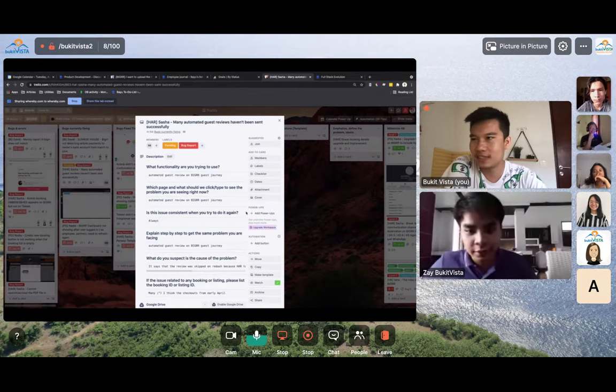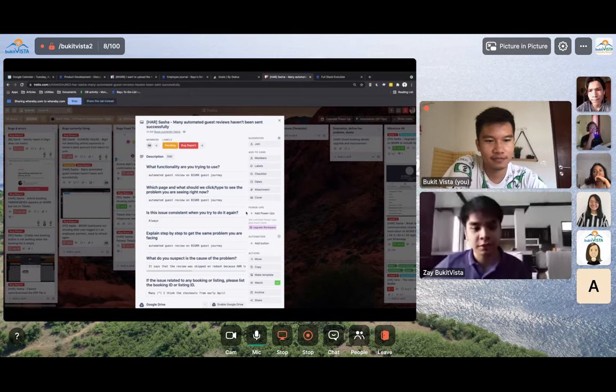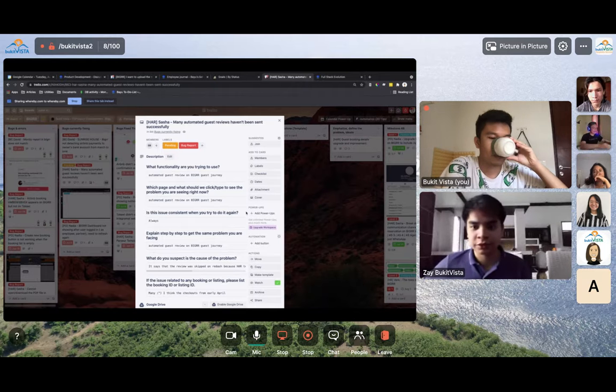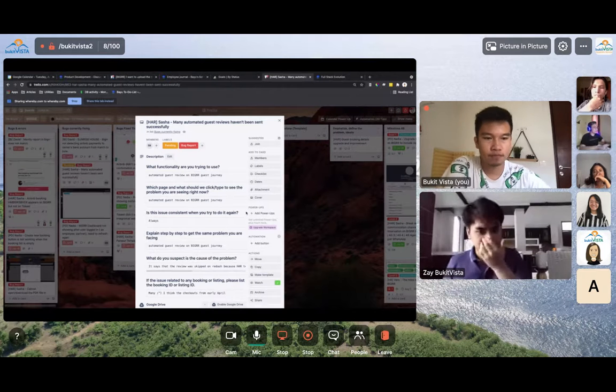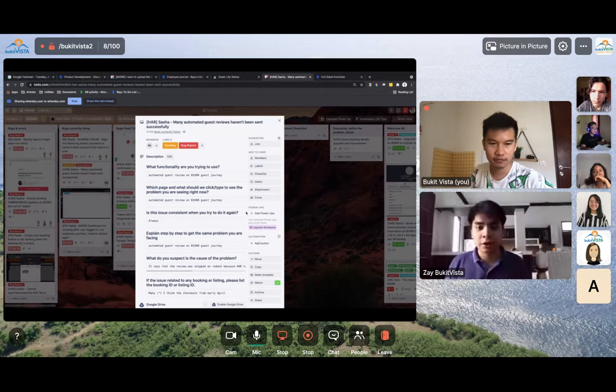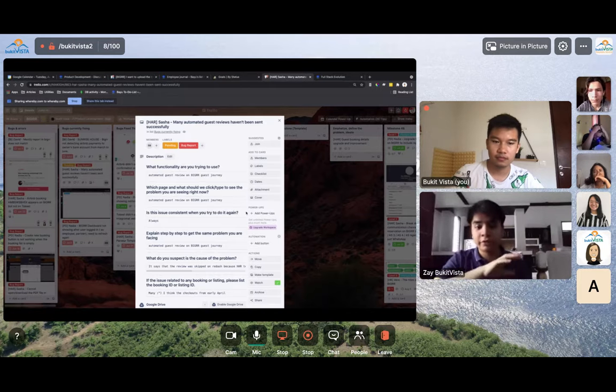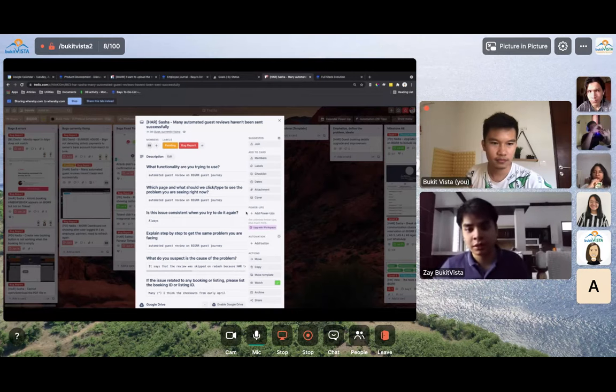May I ask this question, Kak? Yes, Jay. Why don't we have something like stand-ups in sprints in Scrum? Ah, okay. Tell us more about that. Usually inside a Scrum there are three phases. The first one is the sprint backlog and collecting user stories from the PO. Then in development, right after that, we can see the software requirements and the developers can execute them and maybe do some bug fixing. But during the development time, there should be something called a stand-up.